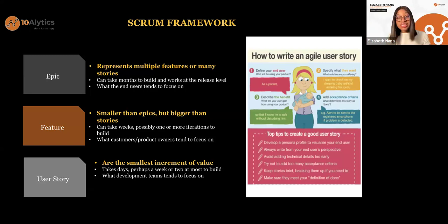As a college student, if your product is going to be serving college students. As a parent, if your product is going to be serving parents. As a homeowner, if you're building a house for someone. You're always focused on writing this user story from the perspective of the person or the group of people that are going to be using it. You never write your user story by saying, oh, as a business analyst, I'm the one working on this. You don't do that. You always write it from the perspective of the end user. And you can't do that if you don't identify who this end user is going to be in the first place.